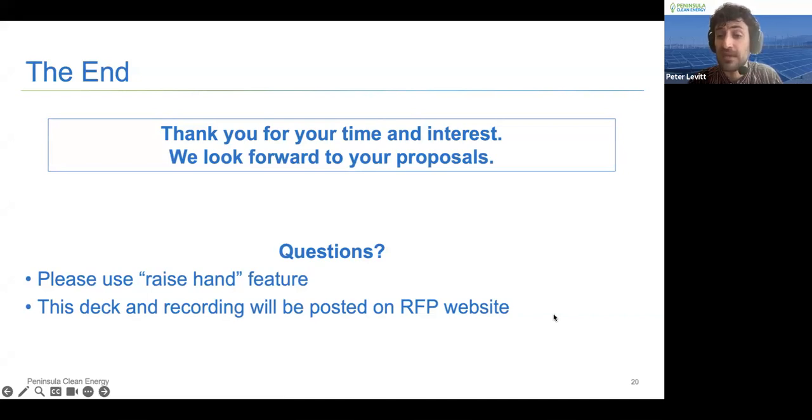For portfolio B, we haven't submitted interconnection applications because we didn't have the final system size for the battery storage. Those will be under the net billing tariff, and as such, we need the final system size for solar and storage to be iterated on with the customer, so that those sizes can be included in the application.